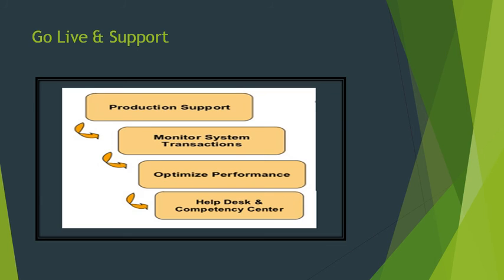If there are any issues, there is a helpdesk to help key users — they can raise a support ticket, and there are different SLAs under which the consultant or the consulting firm needs to resolve the tickets of the client. This is regarding go-live and support, after which hypercare starts — for a defined number of months the implementation partner will continue to support the client.